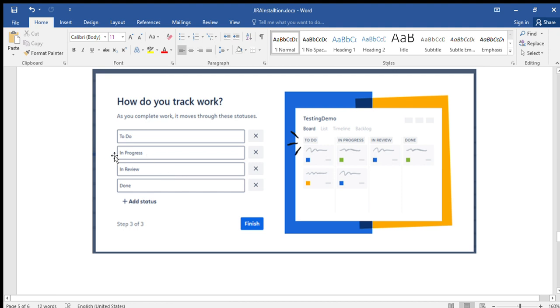Once it is done, we review whether all the tasks are closed, including the unit testing and all the testing tasks, with proper comments, estimations and timing, and whether we have given all the required details. If everything is done, we go to the done state and mark it as done. So these are the steps you can follow.